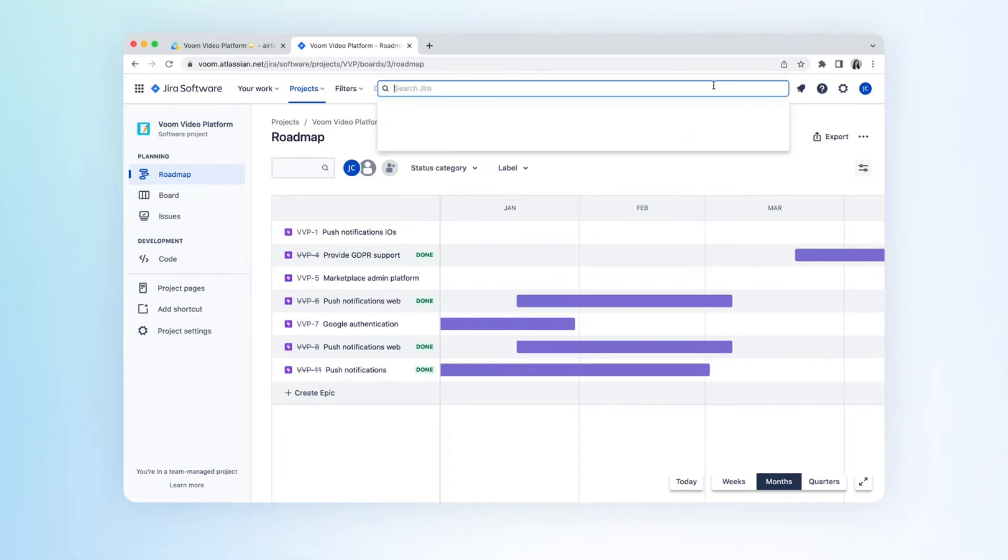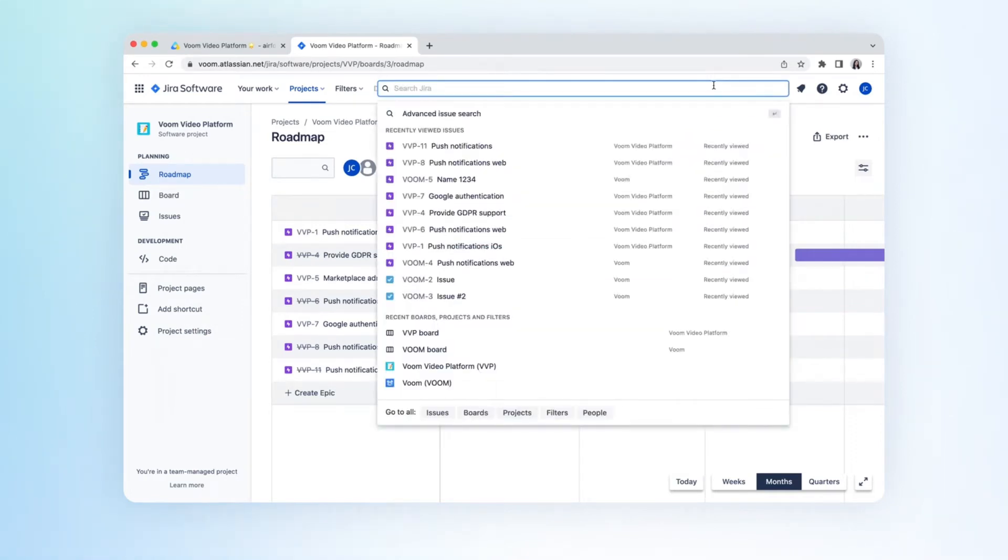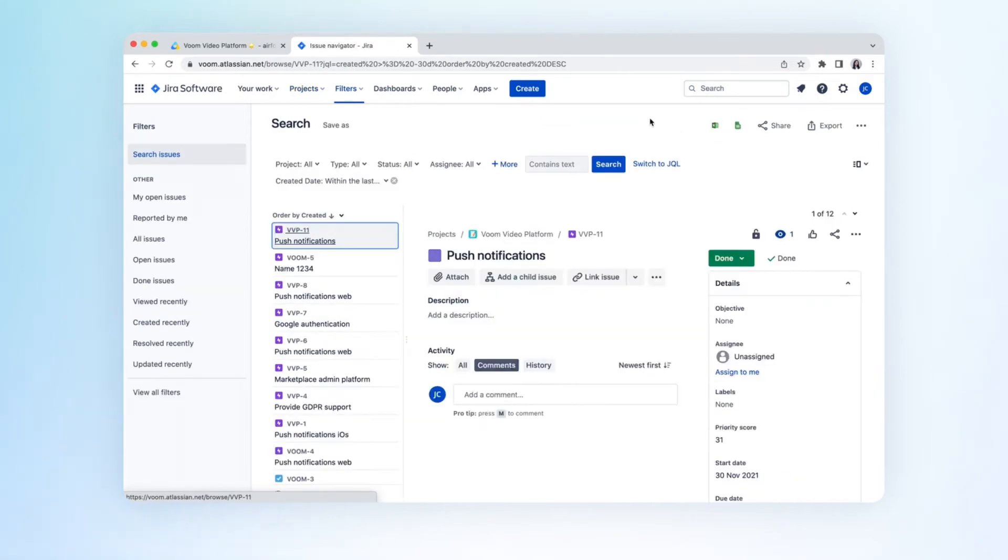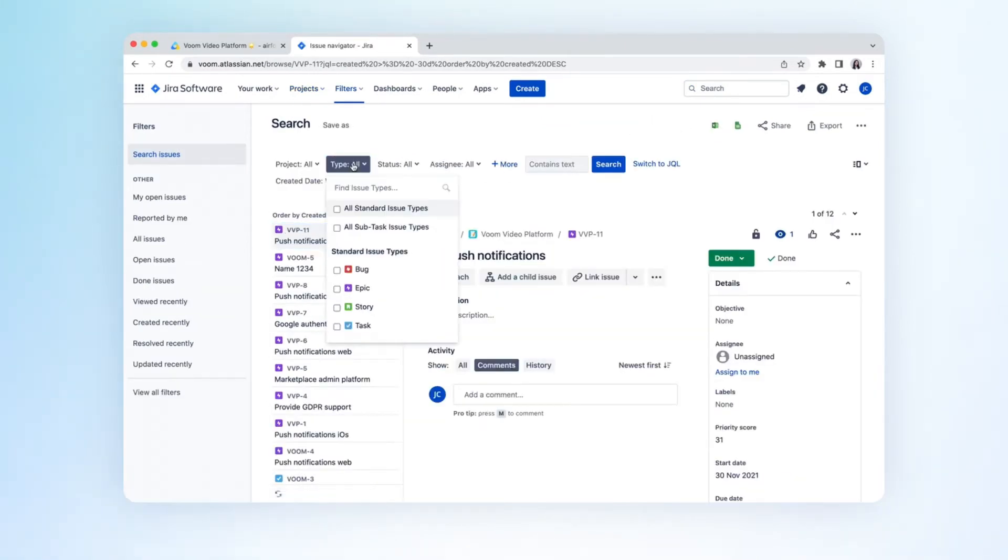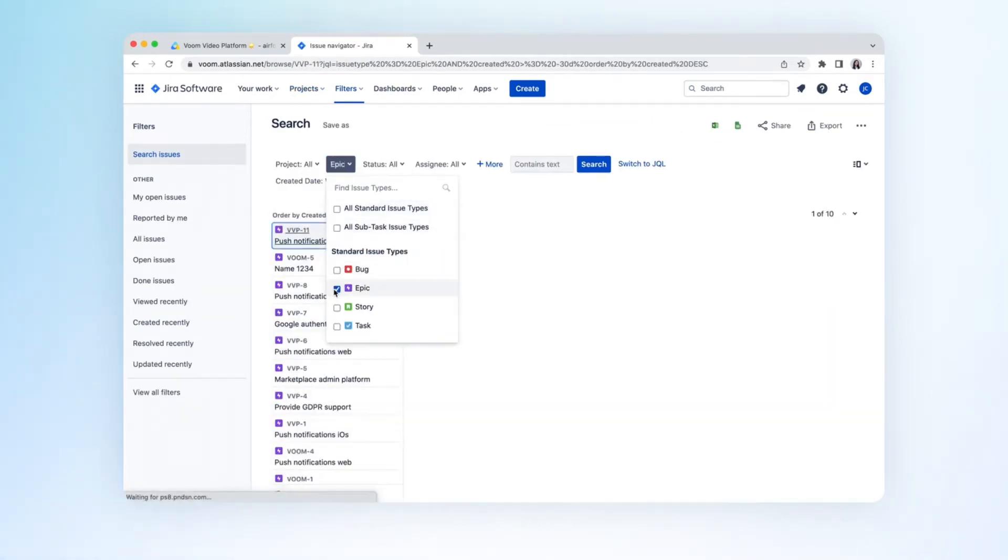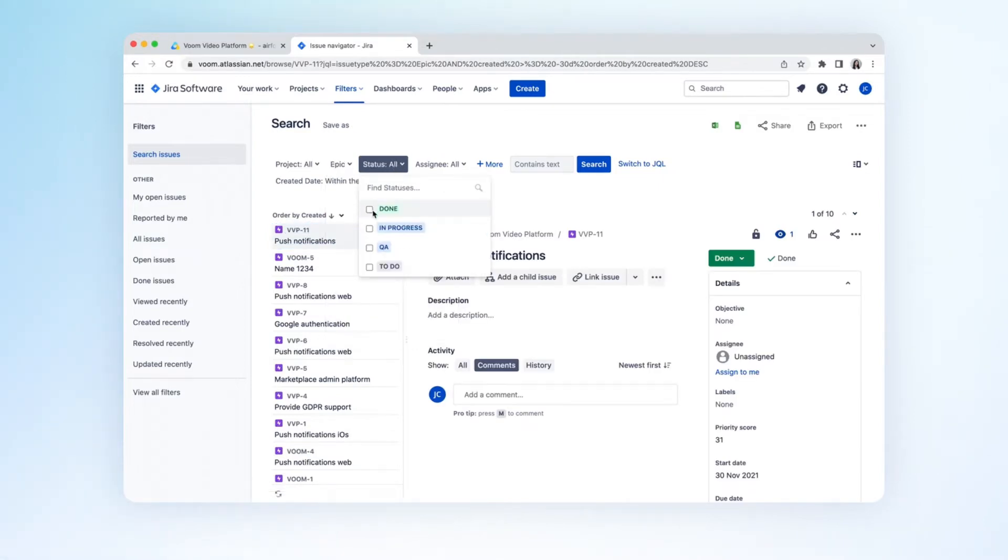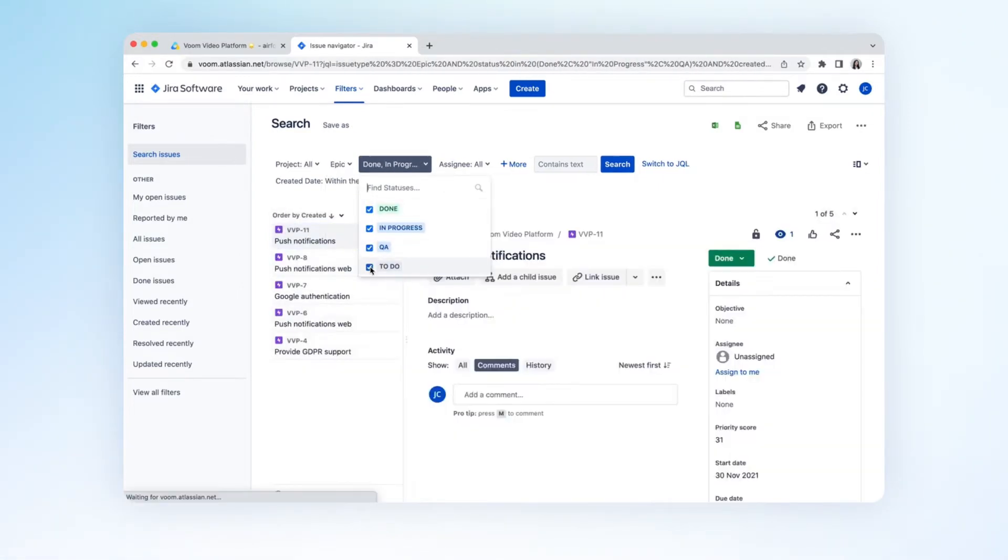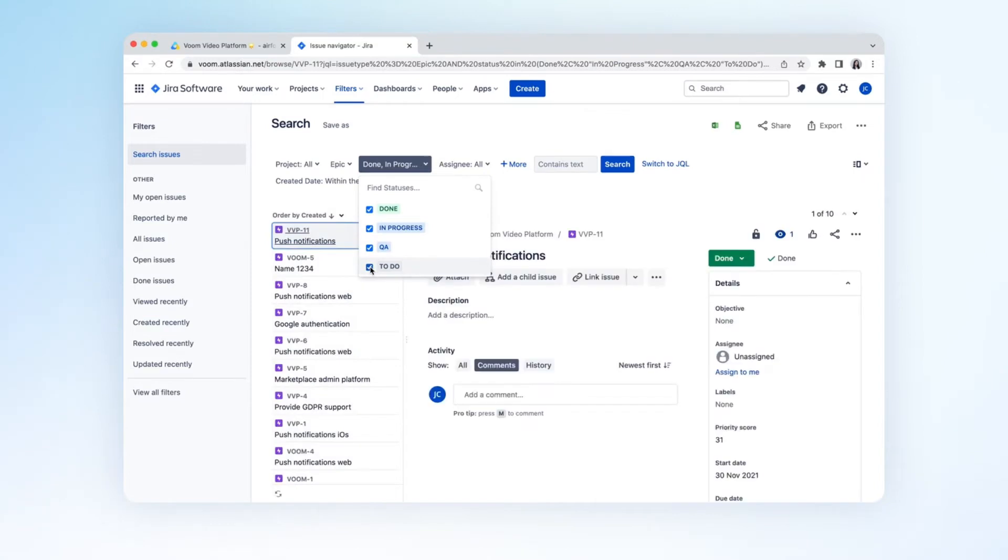Go to your Jira project and then click on Advanced Issue Search. For this example, we will import and sync Jira Epics. Select what you need in the drop-down menu and click Switch to JQL once you're done.